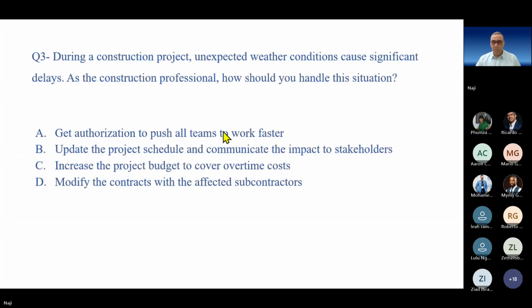3. During a construction project, unexpected weather conditions cause significant delays. As the construction professional, that's being you, how should you handle this situation? Unexpected weather conditions. A, get authorization to push all teams to work faster. B, update the project schedule and communicate the impact to stakeholders. C, increase the project budget to cover overtime costs. D, modify the contracts with the affected subcontractors.